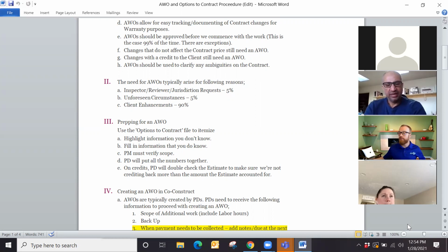Are there any other examples of unforeseens that you all would like to talk about? I think materials is a huge opportunity that we miss, even prior to the COVID clause. If we ever went into a project where we ended up spending 2 or 3 times more than we anticipated on the cost of materials, we've never gone back to the client to say, hey, this is an unforeseen, because we just assumed, well, material costs, we eat it. Now, I assume you're making the assumption that we're getting the exact same materials and it's just a material escalation on that. Correct. Material escalation.